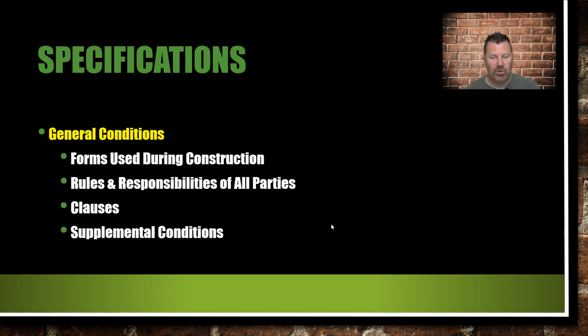Regarding that, specific insurance that you may have to have. You may only carry $1 million worth of general liability. They may require $2 million, or things of that nature. So you got to read it and make sure that you're able to provide that to the owners.